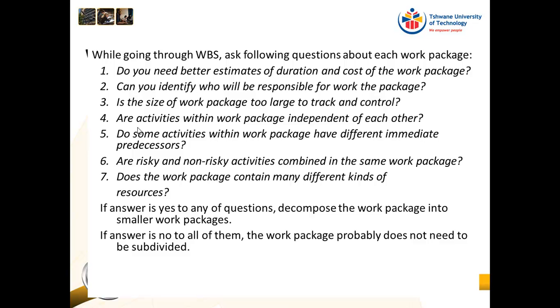Does the work package contain many different kinds of resources? If I need a plumber and an electrician and a plasterer to do that one work package, I probably have not broken the work package down to a low enough level.